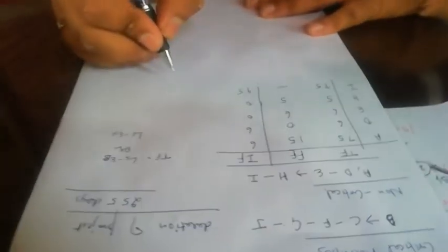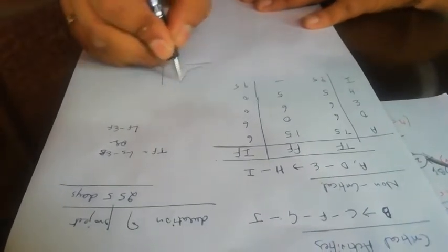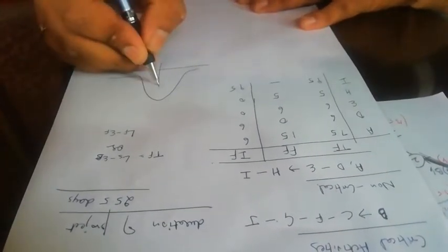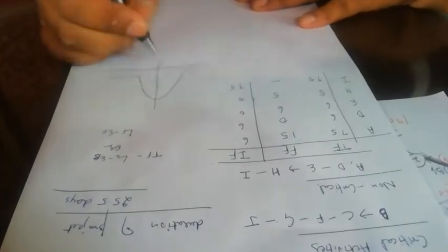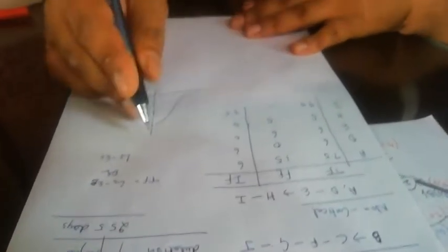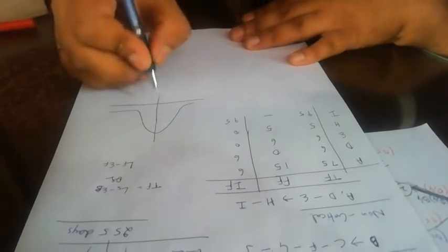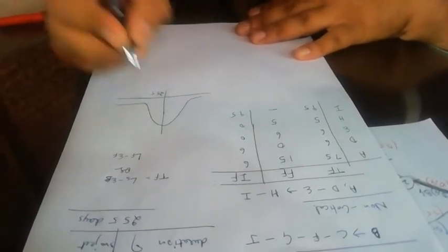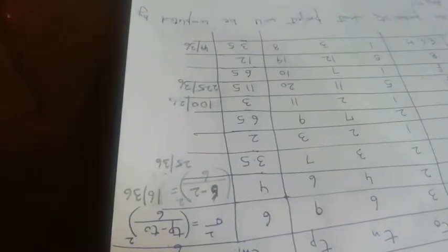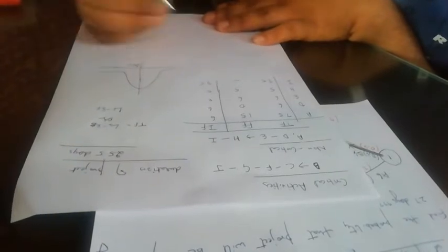So normal distribution will be a bell-shaped curve, and this is the mean line. The mean duration which is given to us is 25.5, which is our critical activity duration we have calculated. So this is our mean. Then we want to calculate that the project will be completed before 27.